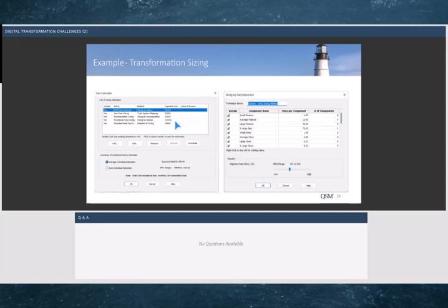If I look to the right, you can see an example of that. This is an example of the decomposition where we break something out into more detail. This is an agile template where we've got number of features. You can see small, average, large. I've got epics, I've got stories. Let's look at the features for a second. I've got 8 small features, 4 average features, and 2 large features.